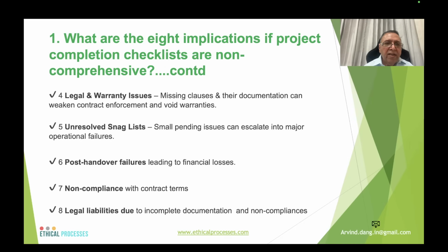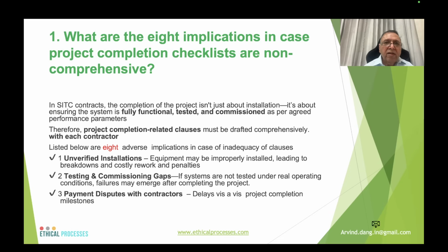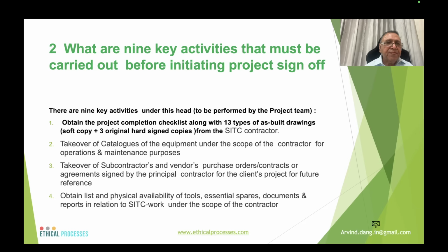4th, legal and warranty issues. Missing clauses and their documentation can weaken contract enforcement and void warranties. 5. Unresolved snag list. Small pending issues can escalate into major operational failures. 6. Post handover failures leading to financial losses. 7. Non-compliance with the contract terms. 8. Legal liabilities due to incomplete documentation and non-compliances. Now, these 8 implications are based on my understanding of having negotiated many contracts both in the engineering and manufacturing industry and also in the real estate industry.